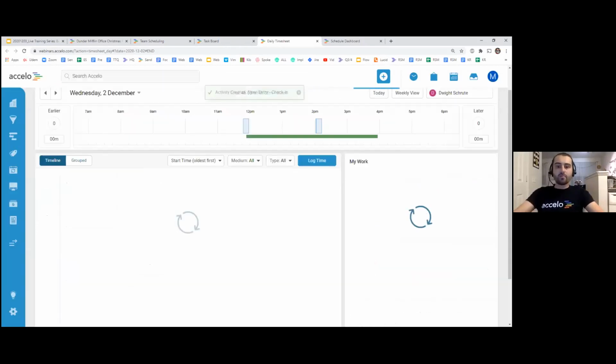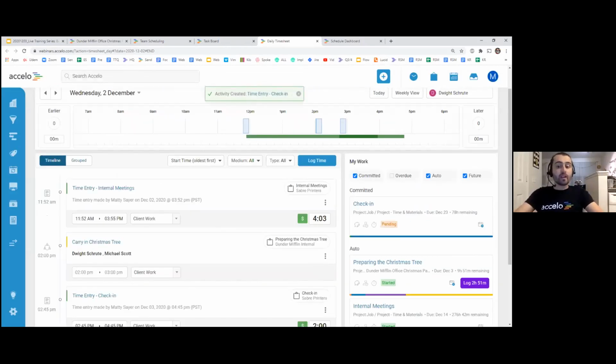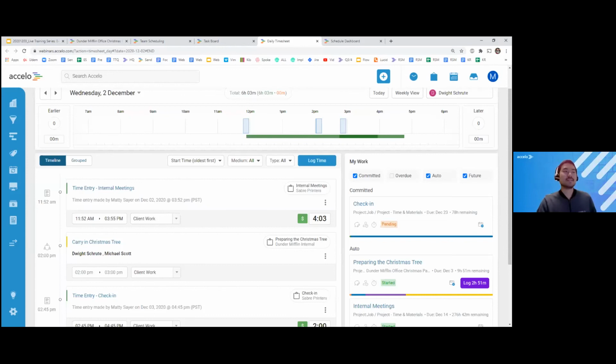If multiple people are logging time to a committed booking, will the rate be set to that of the task as detailed by their individual positions or overridden by the rate card? That's a good question. It totally depends on the situation. The task could be set to only take in a specific rate. In that case, it might just be $100 an hour, regardless of who's logging time.